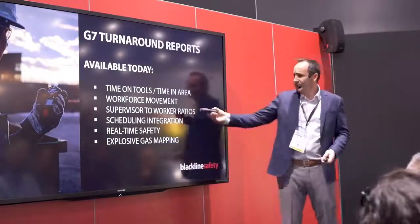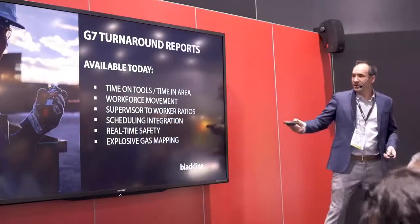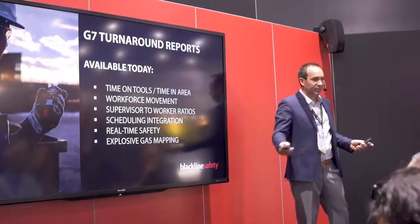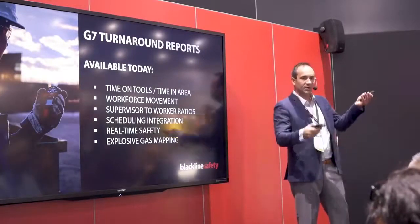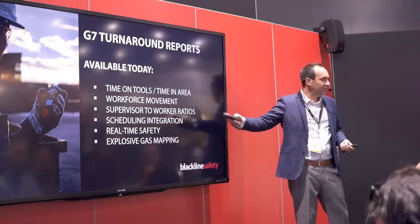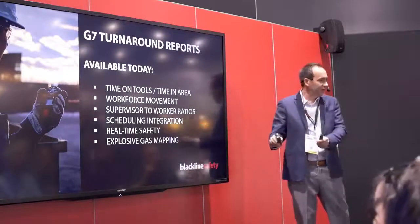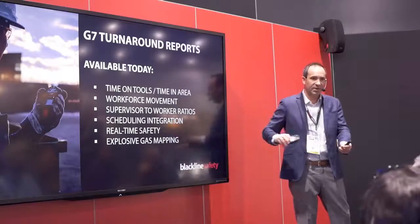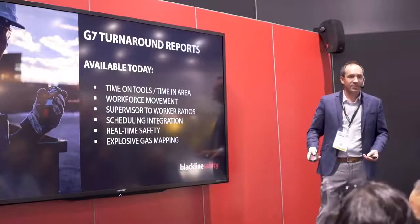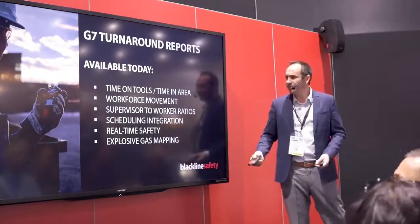This is a really interesting one, supervisor to worker ratios. We've had companies tell us that their leading indicators say that when the ratio of workers to supervisors gets too high, so there's too many workers and not enough supervisors, that's when accidents happen. So we've started to analyze that. We've said, what was your plan on this job? What was the ratio you wanted to have? And we can show them all the areas, all the times, and all the places on the job where they violated their own ratio. And they can just go back and say, well, why did that happen? So we're just enabling people to have that conversation, to start looking into what's happening here.